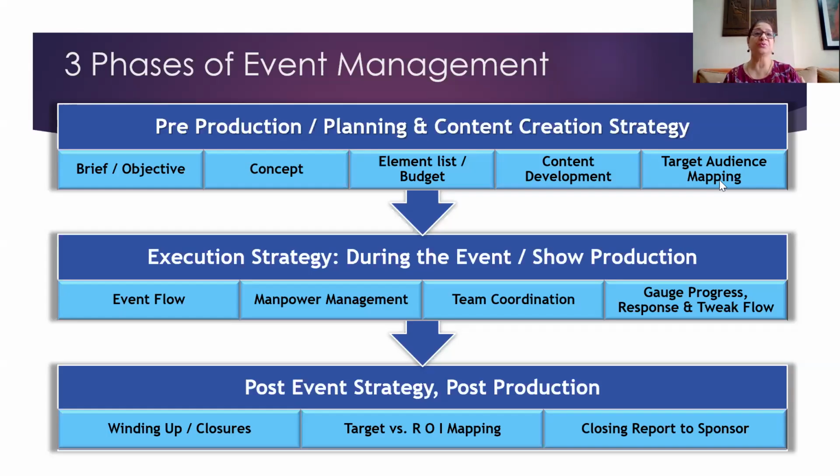The planning process for a marathon is a good 4 to 6 months. Creating the hype for the event starts 3 months in advance, so we have our media plan in place and all the ads coming out. This is a hypothetical example for one event, but you can apply it to other events.